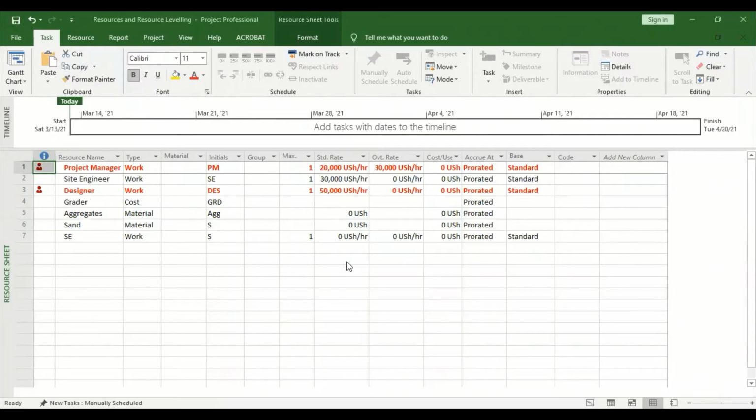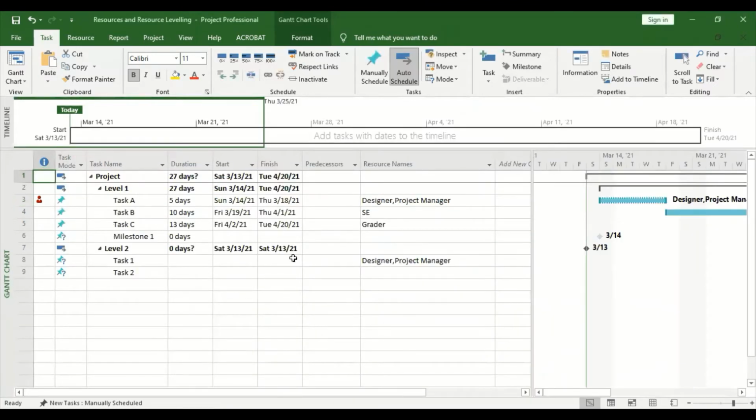If you are in Gantt chart and you are under tasks, the warning will be about that task you've over allocated a number of resources onto. For example, a task only has 5 days, but you've allocated like 2 people on the same task. It doesn't mean that they shouldn't be 2, but according to the analysis of the software, you over allocated resources on a single task. So it can be up to you to adjust.